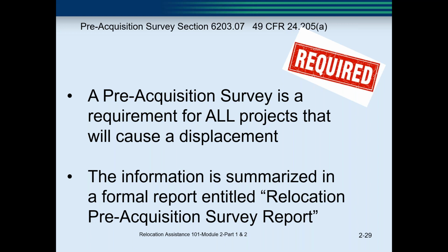So section 6203.07 of the Real Estate Manual and 49 CFR 24.205(a) states that all projects that will cause a displacement need to have a pre-acquisition survey. The pre-acquisition interview is routine if you have a relocation parcel. It becomes a part of the relocation parcel documentation.